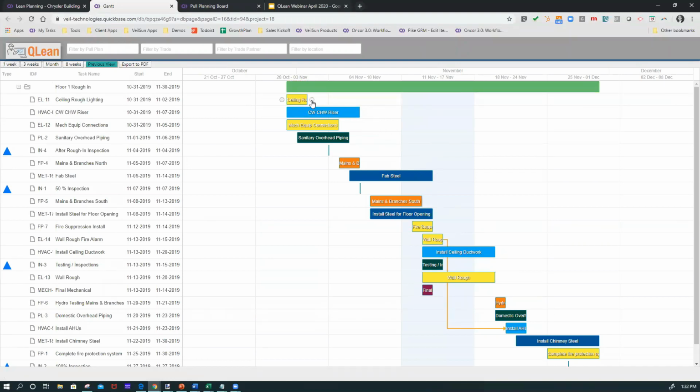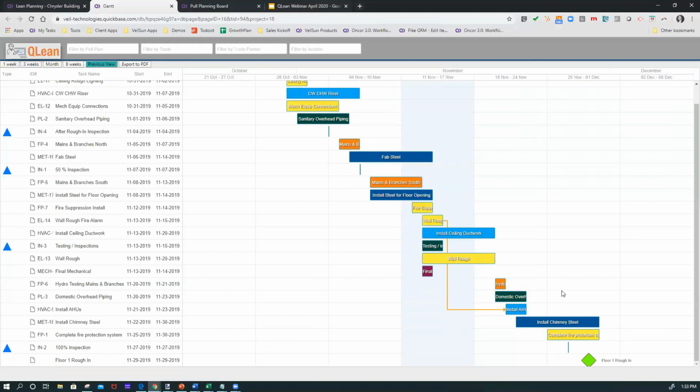We didn't show this when we were setting up the milestone, so we could get right to the board, but you can actually set several things that adds logic to this schedule, such as when are your company holidays? Are there any holidays or days off specific to that job site? So maybe you're only working 4-day weeks there, or maybe you're working 7-day weeks. And it can even get down to the subcontractor level where you know that a subcontractor maybe only works 2 days on the site. So you can put all those settings down when you're setting up the milestone, which is a part I didn't show. And it will take all that logic into effect in generating the schedule.